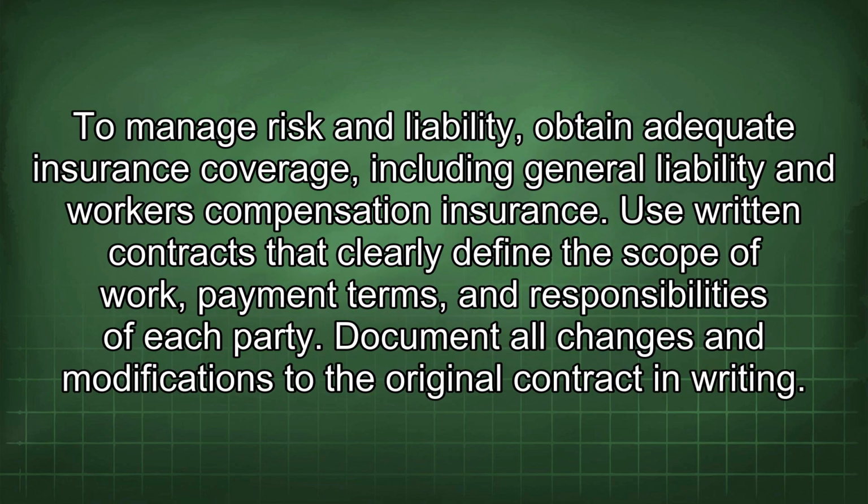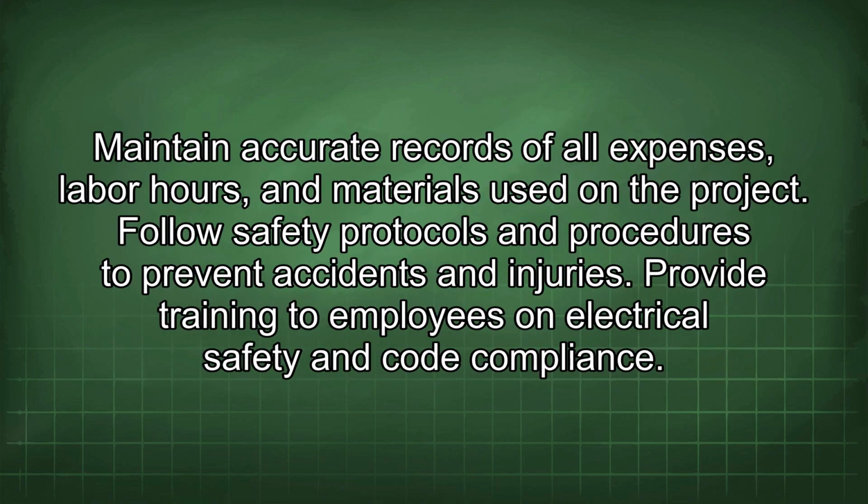To manage risk and liability, obtain adequate insurance coverage, including general liability and workers' compensation insurance. Use written contracts that clearly define the scope of work, payment terms, and responsibilities of each party. Document all changes and modifications to the original contract in writing. Maintain accurate records of all expenses, labor hours, and materials used in the project.